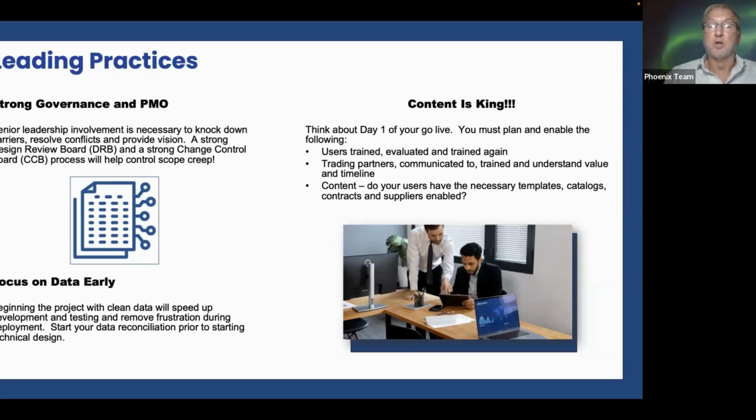Additionally, the data should be the exit gate from your prepare phase. Now, it could be design phase as well, but more importantly, it's got to be done prior to build phase. The reason is that the build is going to be relying on data to be tested appropriately. So if you don't have your data squared away, your testing will fail. So prepare phase is a great gate, at a minimum, mid design phase. That makes sense?